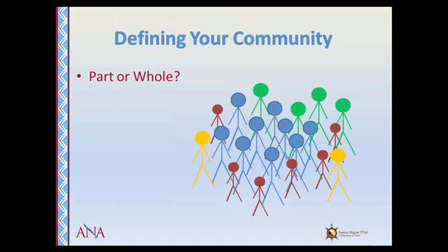You also want to get some letters of support from potential project participants. If you're doing a project for young children, get letters of support from some of their parents. If you have a project that focuses on high school age students, get letters from them indicating that they're behind the project and are willing to participate. We've seen projects that have struggled getting participants because the target audience wasn't involved in the planning of the project.